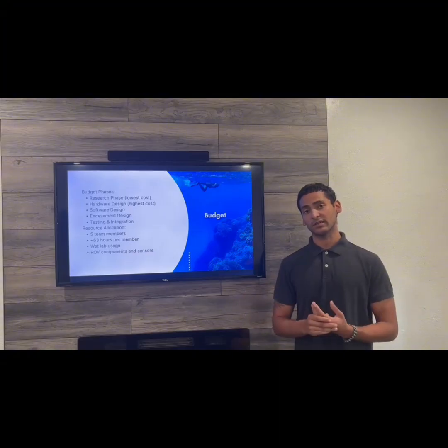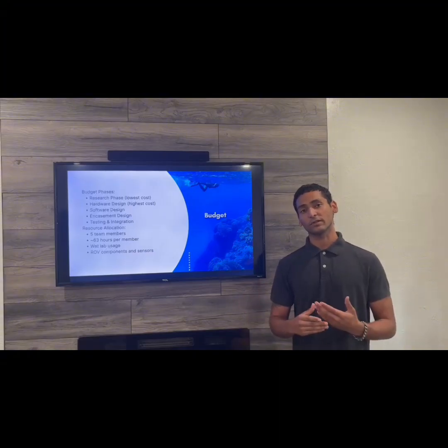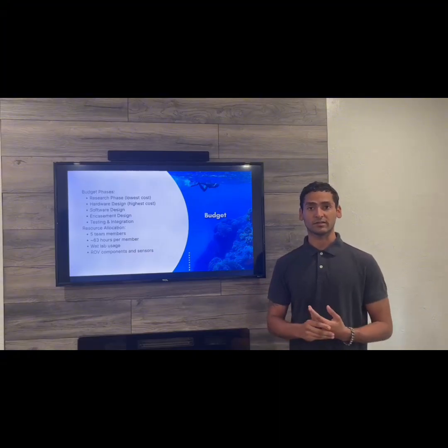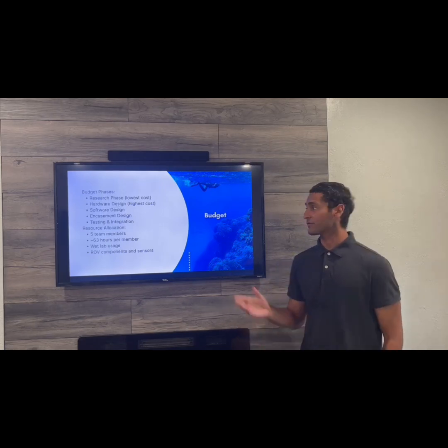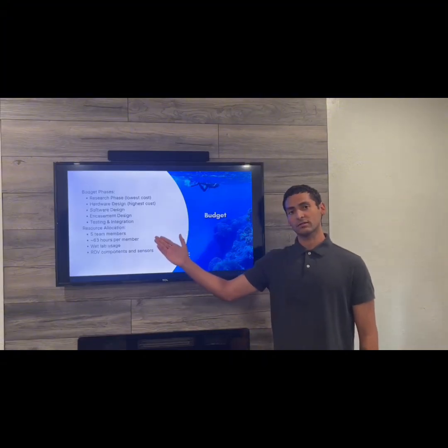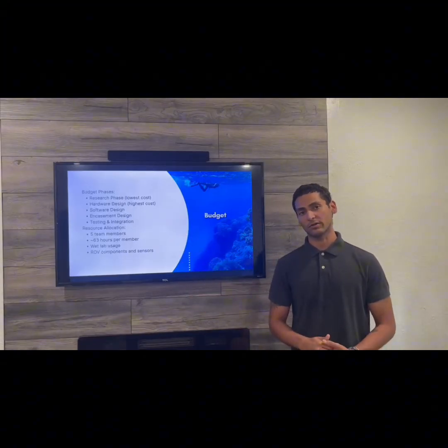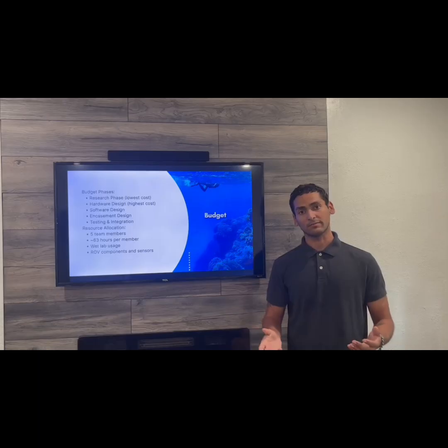After collecting this amount of data or information, we'll cross-reference and start a proactive risk management case where we can simply start working on our project or concept design before buying any components. After this, we will go into our hardware design. In this phase, we buy the hardware components and we start renting out the wet lab.